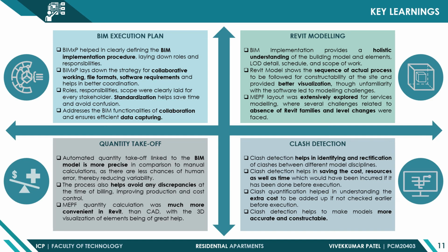In quantity takeoff, the quantities extracted from the Revit model are more precise in comparison to manual calculations, as there are fewer chances for human errors. MEPF quantity calculation was much more convenient in Revit than CAD, with the 3D visualization of elements being a great help. In clash detection, it helps in identifying and rectifying the clashes between different model disciplines. It saves the cost, resources and time which would have been incurred if it had been done after execution, and the clash detection helps to make models more accurate and constructible.